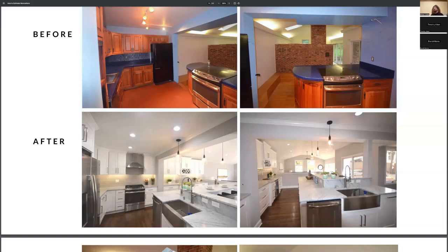If you're going to remove walls or do anything structural, try to get that all out of the way as quickly as possible. The problem is, I'd never recommend commissioning an engineer or an architect before you close. Deals fall apart all the time for the most insane reasons. I've had people die the day before closing. Anything could happen. And the minute you start spending money, you're losing money until you make it back. If you don't own the house and you're spending money on an engineer, factor that into your budget, right? If you're borrowing, factor that into the interest you're going to pay on that loan while you hold it. So the cost of removing a wall might not benefit you in terms of the return after you factor in all the expenses that come along with it and the time.